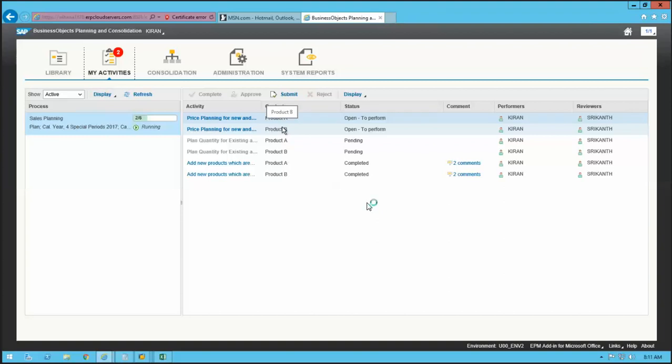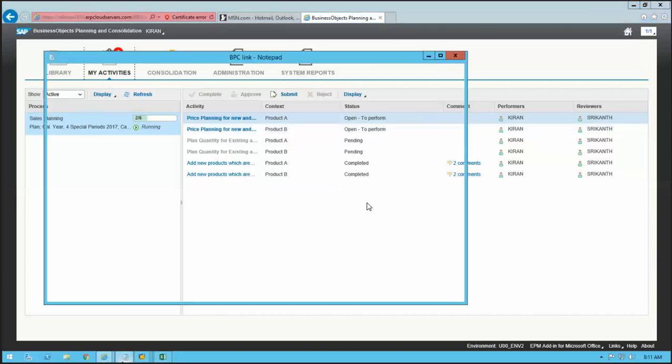If the customer says my planning is based upon profit center, and if profit center A completes activity 1, the system should open activity 2 for the same profit center A, then you have to give the criteria as matched. Okay, this is one thing.